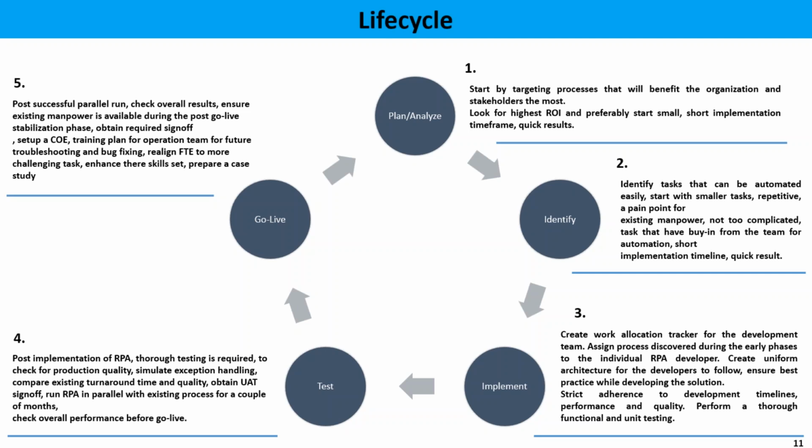After your development completion, we have the testing environments as well, like other applications. Here we have 2 kinds of testing environments. The first one will be the SIT, the second one will be the UAT. The SIT we call the system integration test, and UAT we call the user acceptance test.